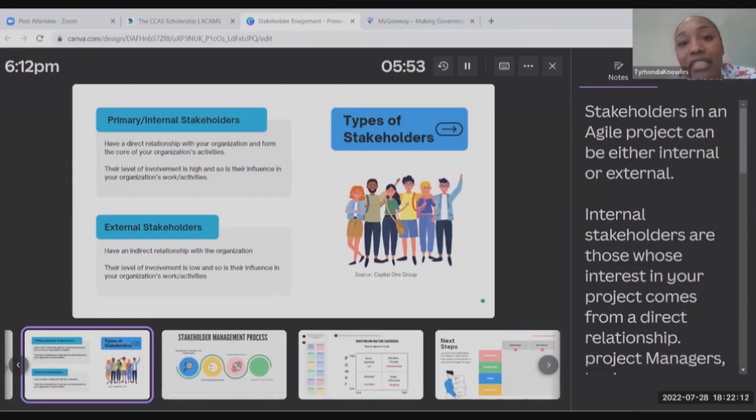And you have to manage that process, especially if you're working in an agile based environment, so that when you're delivering value to them in particular phases, they'll understand and agree that it was agreed we will create this particular application, however we'll only have these features at this particular point. Excellent. So we'll loosely use the word agile, but we'll let them know the approach we take is to release in phases. In the first phase, we know you're asking for this and this, but we'll only be able to release this to you. In the next 3 months, you will be able to get this, this, and this.